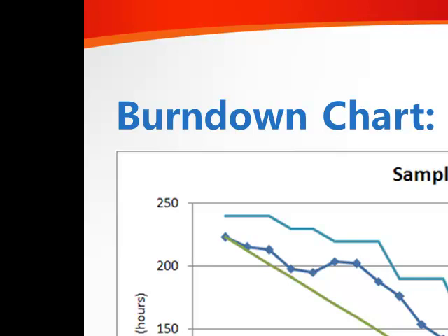Now, as far as this chart goes, the remaining tasks, denoted by the light blue line, have not gone up. So that means that the sprint still has the exact same number of tasks remaining. No new tasks were added, but the effort required to finish that same number of tasks has, in fact, been increased. Now, how is this really utilized to help improve our team in SpecDD? Well, this really helps a team to be self-driving.